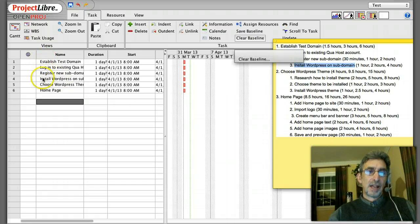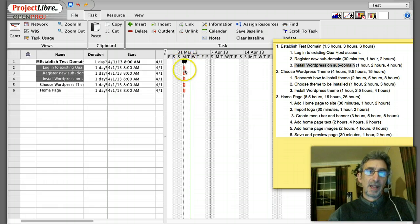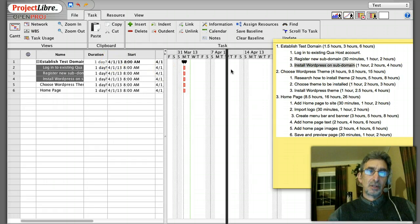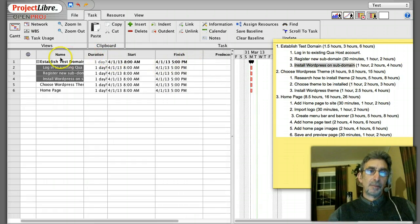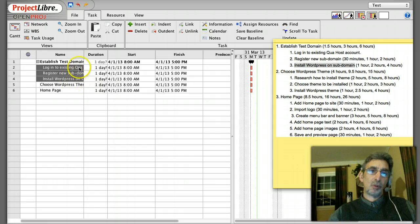To make those three tasks belong to 'Establish Test Domain,' I shift-click them all and indent. Notice what happened: 'Establish Test Domain' becomes a milestone with a bar that spans whatever time length the three items below it cover. The duration for that milestone will be determined by the total duration of the three tasks underneath — we call that 'rolling up,' where the time rolls up to its parent item.